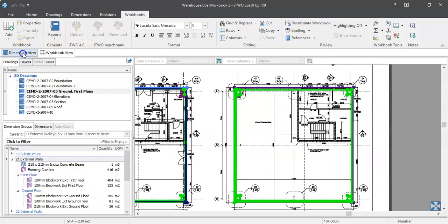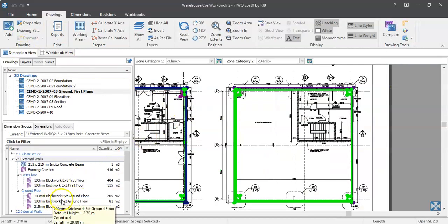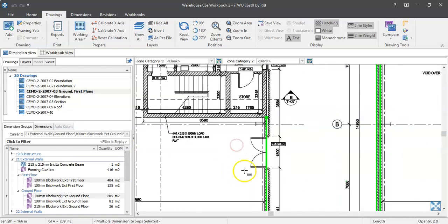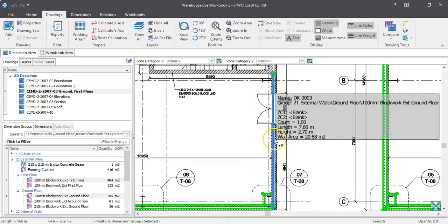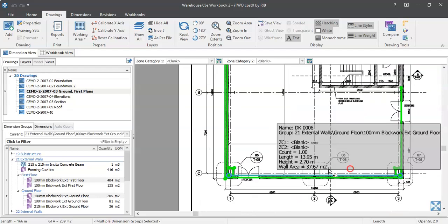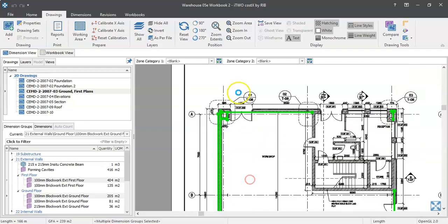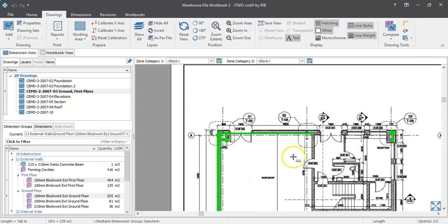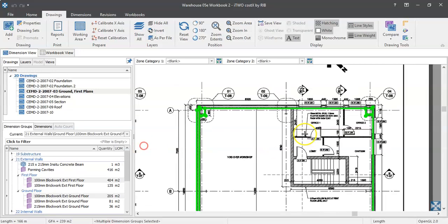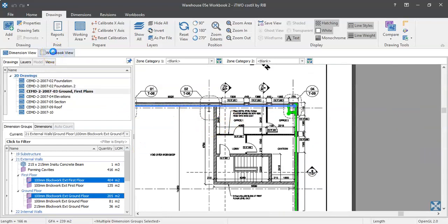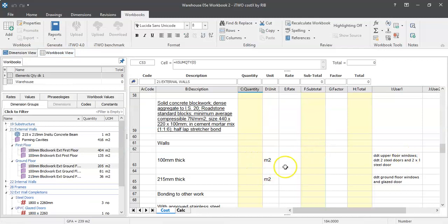If you wanted to see exactly what you're kind of trying to figure out here, click both the ground brick, there's the brick blockwork, 100 blockwork, 100 blockwork. So what we need to deduct out is that door, obviously, on the internal side. This door gets deducted twice because it's got two leaves to deduct. This door once. And then on the first floor, all our OPEs need to be deducted. Okay, so that's what we're kind of trying to figure out, and that's what's tricky about this one.